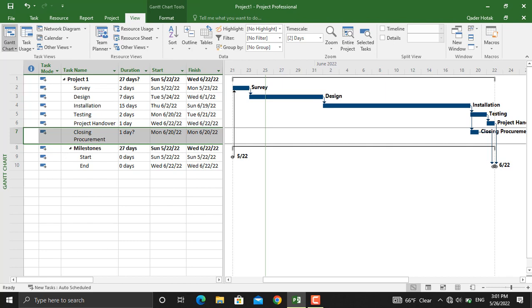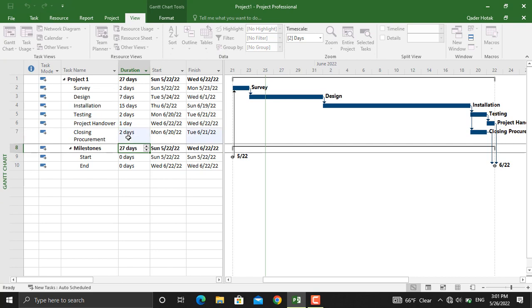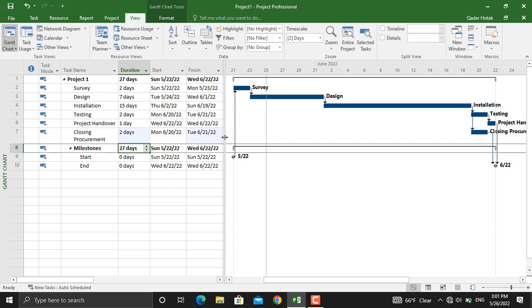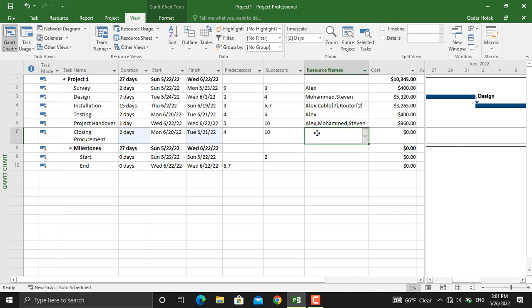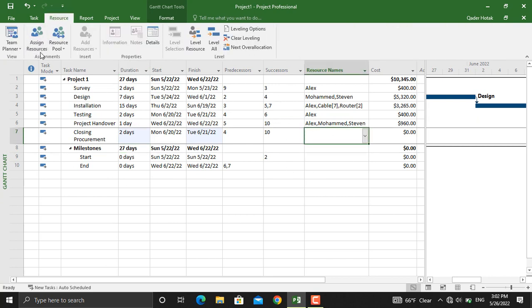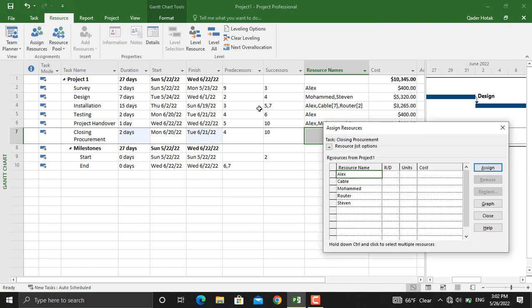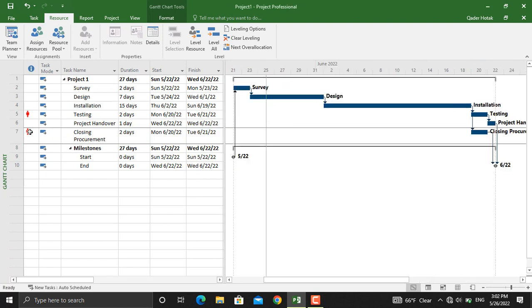Next, let's assign a duration for this activity, for example two days. Now out of the resources that we have assigned for our project, let's assign another resource for this activity. We will go to resource, assign resources. We will assign a resource, for example let's assign Alex.